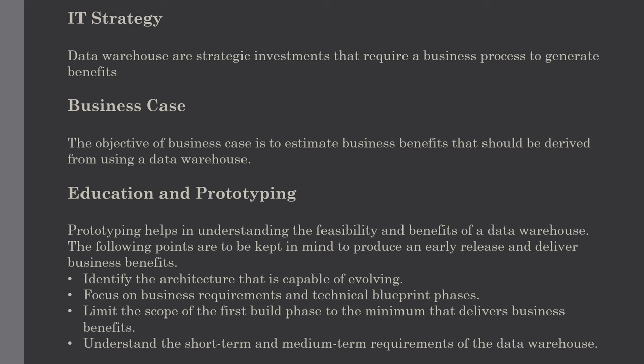The next phase is education and prototyping, which is a very crucial phase. Organizations experiment with the concept of data analysis and educate themselves on the value of having a data warehouse before settling on a solution. Prototyping helps us understand the feasibility and benefits by applying the data warehouse throughout the organization. A prototyping activity on a small scale can promote the educational process, and as long as the prototype addresses a defined technical objective, it can be thrown away after the feasibility concept has been shown.